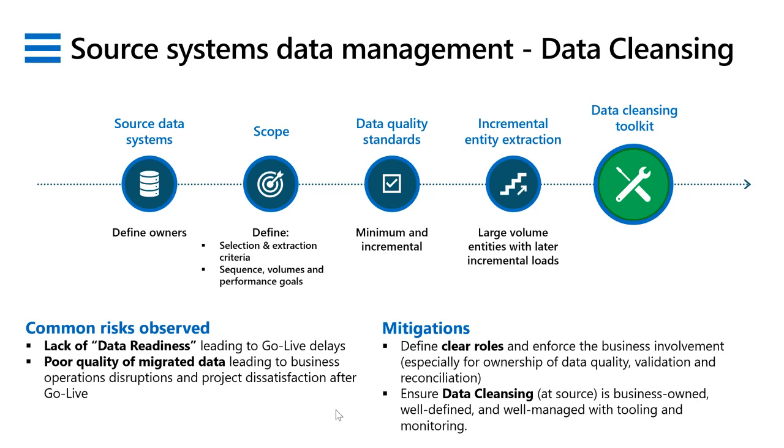Of course, sometimes that is not possible, but you should do everything you can to try and fix the problem as close to the source as you possibly can. And for that, you need to have a very clear definition of this customer record in this legacy system. If it does not have these attributes, we are not picking it up. It's not coming over into the new system.